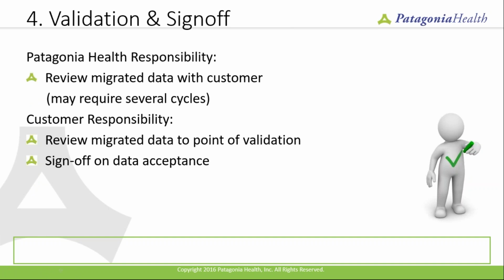Then step 4, validation and sign-off. So finally, we execute the final migration process to the live database, and actually for larger, more detailed conversions, we'll build it out for customers to click through within the application. And this too may require several cycles to finalize, as there may be some corrections to make to either the programs or ultimately the source of the data provided.